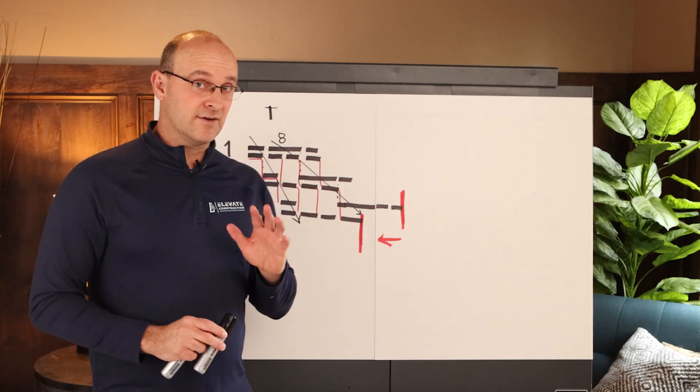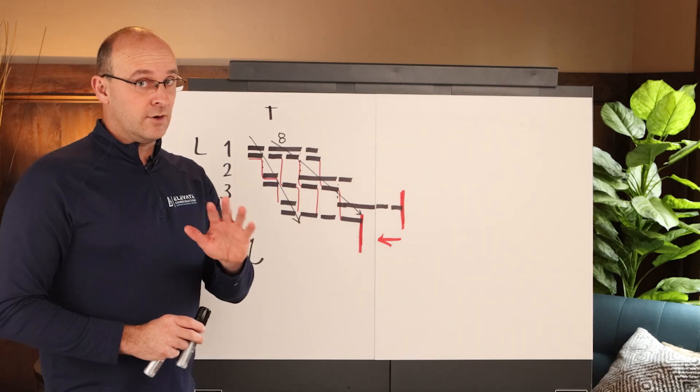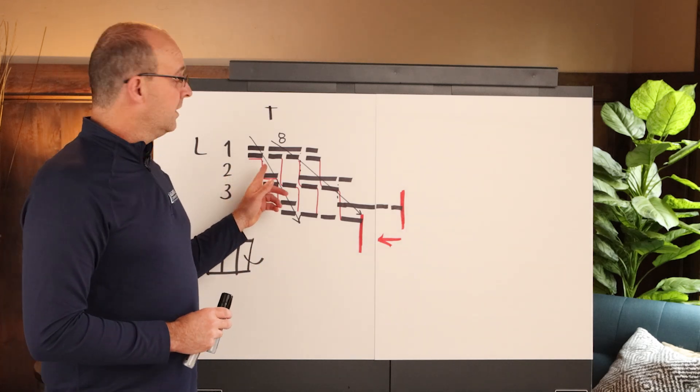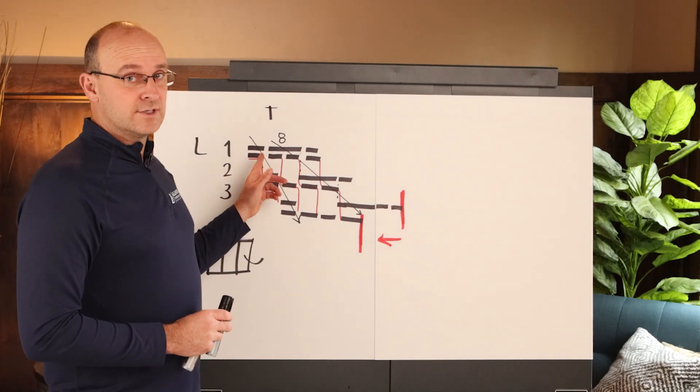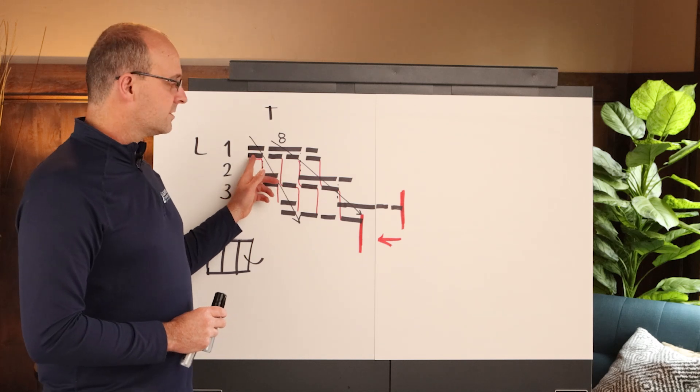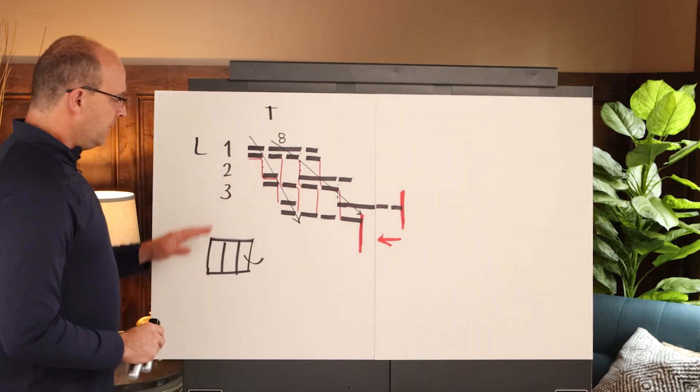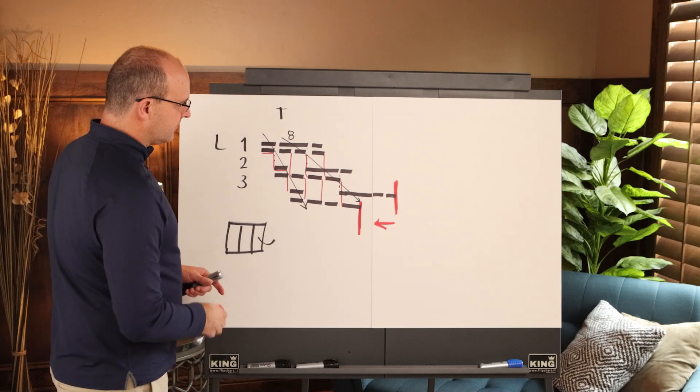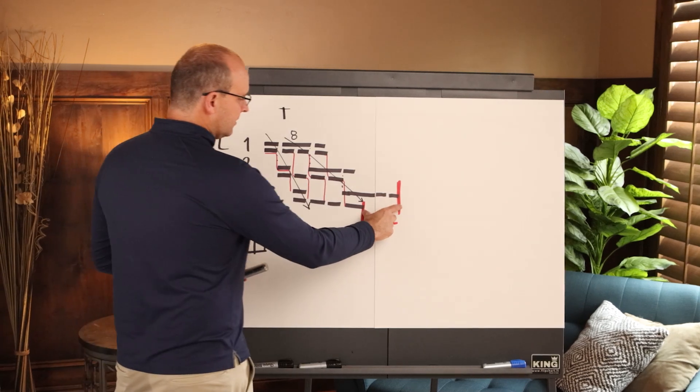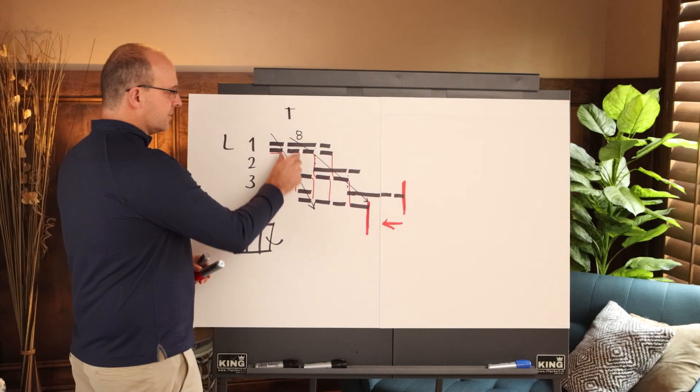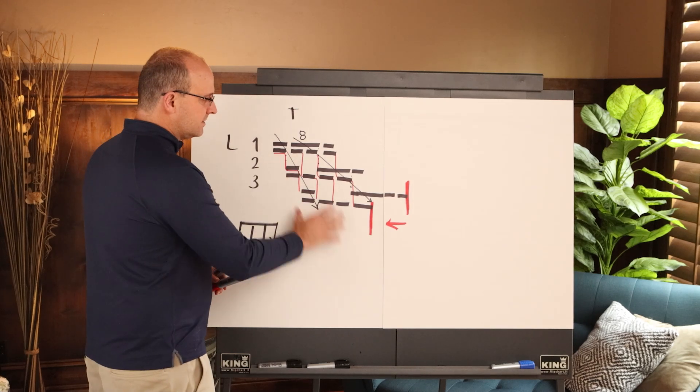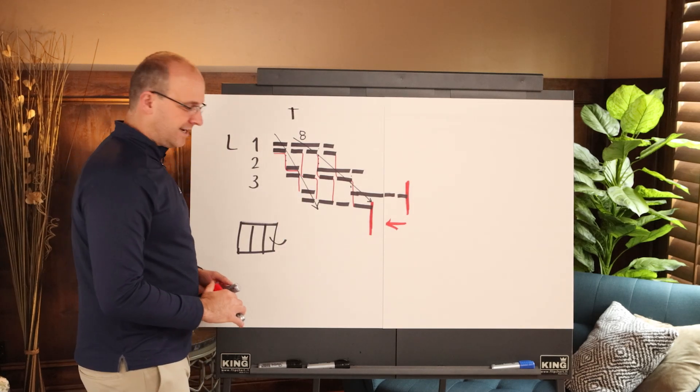So when you're like, Hey, Jay Money, I've maybe heard this from you before. Hold on a minute. You can do this exercise with civil crews, with multifamily crews, with general commercial construction, with industrial. Basically, you take your area and you draw this out and you simulate what your different speeds are. And you can see that you'll have different end dates. So you can split your crews. You can add additional crews. You can improve the process steps. But this is the way that you see your bottlenecks.